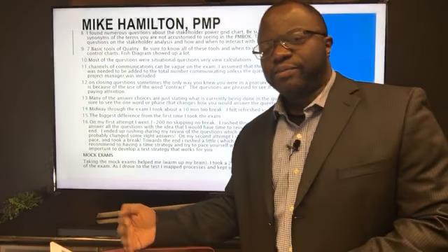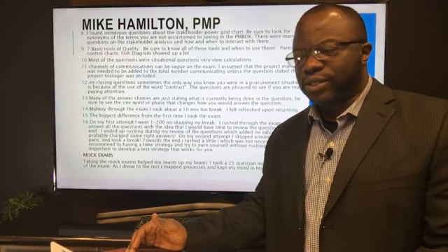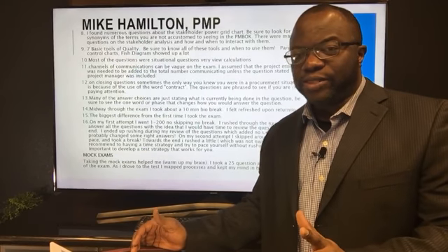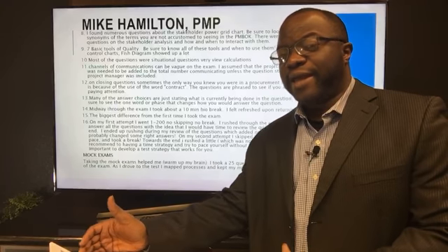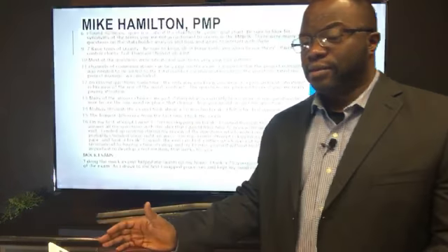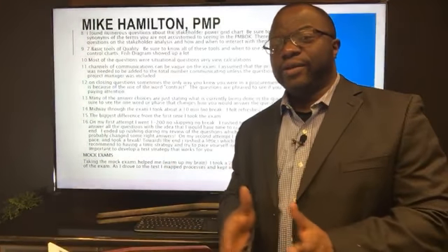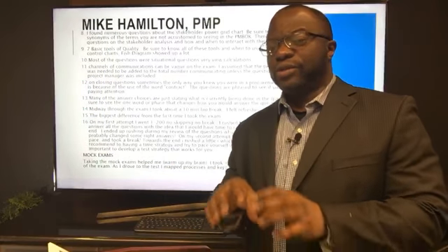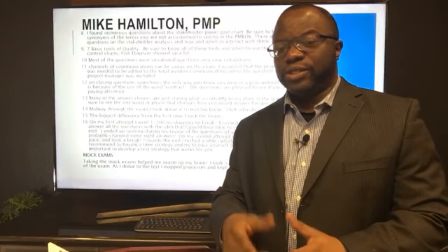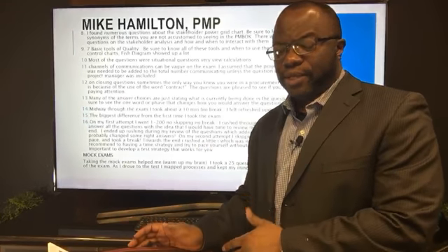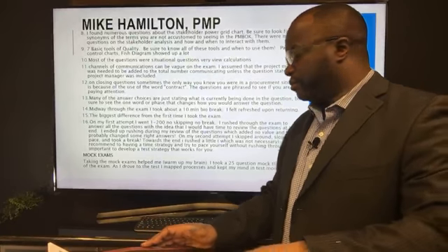So where it says, on a project there are 25 stakeholders and a project manager. Watch this. On a project there are 25 stakeholders and a project manager. How many channels of communication are there among the stakeholders? You see that? In that instance, you cannot add the PM because they're looking specifically at the stakeholders' channels of communication without the PM. So just within the stakeholders.